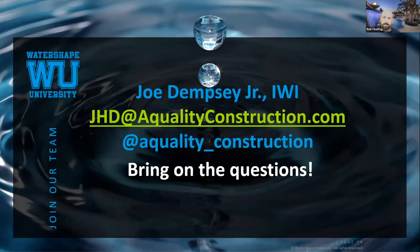But it does take considerable time. And then Jack, on your side, give them a sense of if we're ready to process an order, a movable floor system, from executing the order, what's the time frame to get that product manufactured and shipped to the US and ready for install? Yeah, so we usually say it'll be about 3 to 4 months, if we actually get that contract signed, not including the design phase. Like 3-4 months, we can get on the boat, send it over here.